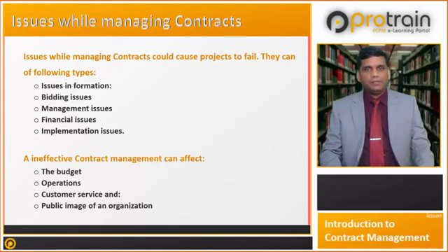Normally it is seen that in most of the contracts, contractor delays in the submission of the program and employer delays its approval of the program. Delays in submission of drawing and its approval by the employer. Delays in submission of invoices or submission of incorrect invoices is also a primary cause of late payments in most of the contracts.